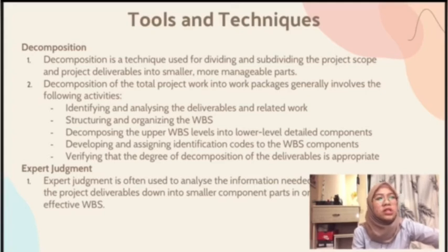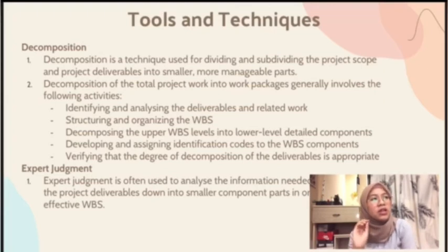And decomposition of the upper level WBS components requires subdividing the work for each of the deliverables or subcomponents into its most fundamental elements, where the WBS components represent verifiable products, services, or results.